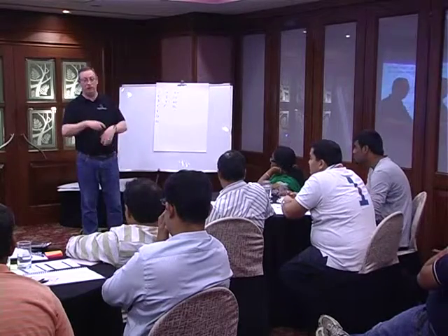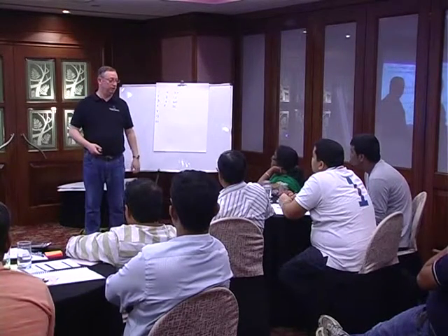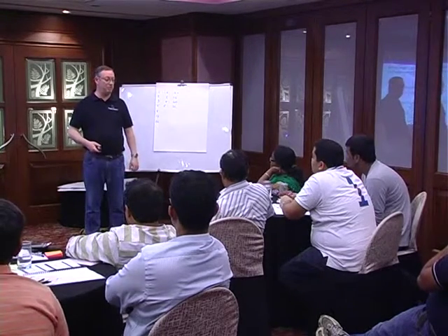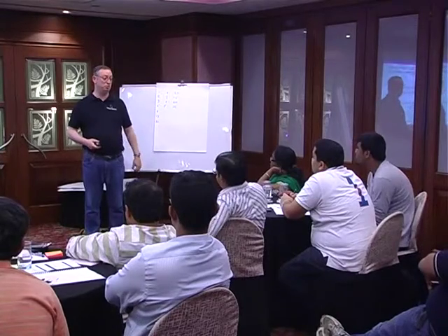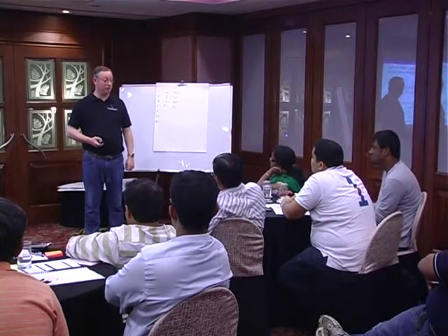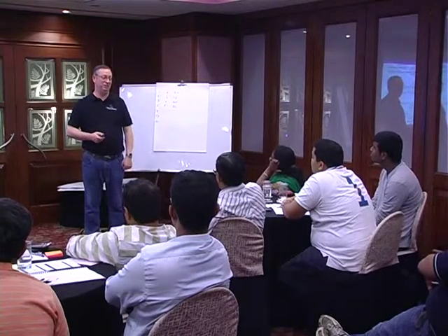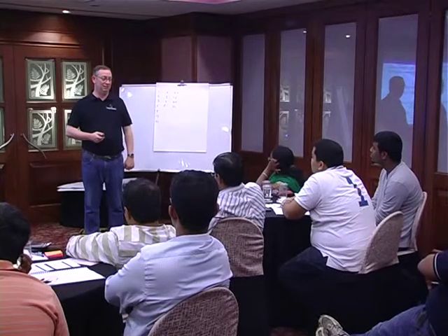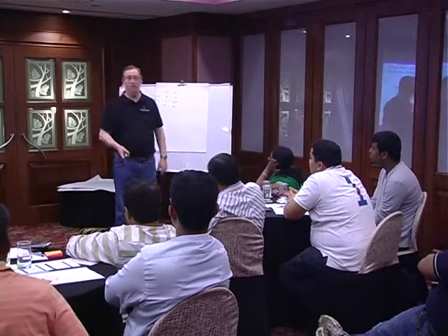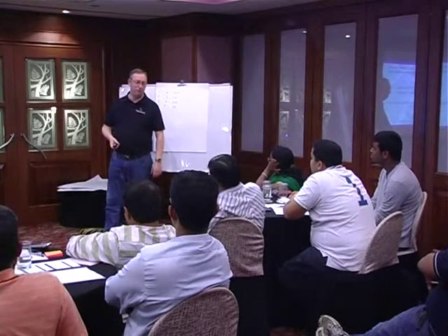Yeah? If they're not finding time to support each other, maybe they're taking too much work in. Maybe it's actually not the fact that they're helping each other and working as a team that's the problem. Maybe they're taking too much work in the first place. Maybe they don't understand the items well enough when they're taking them in. Maybe they're not doing their proper backlog grooming as well as they could. Lots of things can go wrong. Helping each other should not be seen as a problem by the team. That should be seen as a benefit.